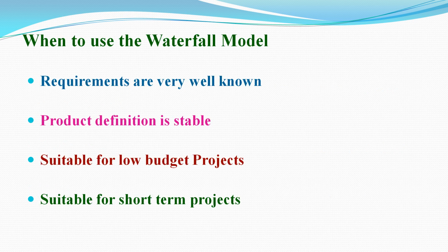Right? And when to use the waterfall model? If and only if the requirements are very well known, or known upfront, that means in advance, for those projects only we can use the waterfall model. And the product definition is stable. That means there should not be any rapid changes for the project. Then only we can use the waterfall model. It is also suitable for low budget projects and short term projects. For these only we can use the waterfall model.